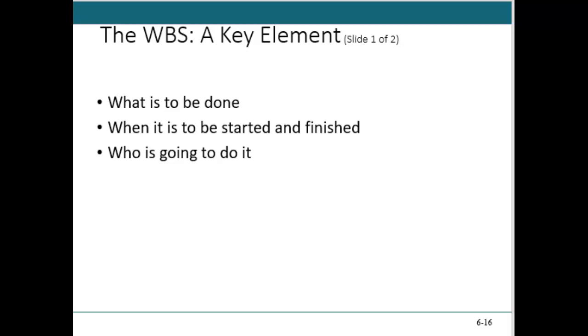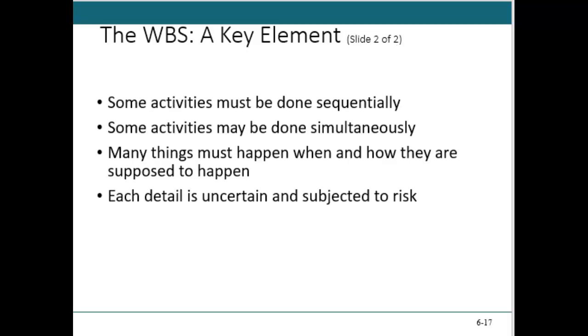In fact, the work breakdown structure normally looks like an organizational chart, right? Not a lot of information. There's always a second element that goes with it, and that's called the work breakdown structure dictionary. And in the dictionary, we're going to have all the details that we need on the project, right? So we're taking the scope statement and decomposing it. That's the tool we use, decomposing the scope statement into this work breakdown structure.